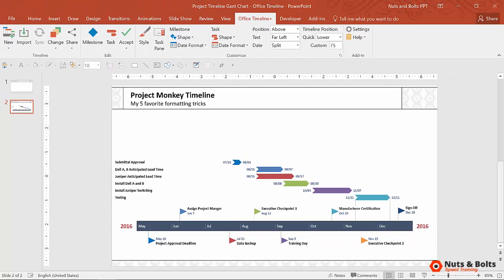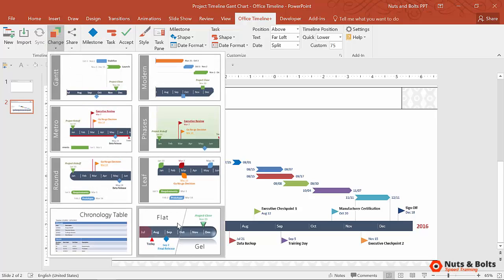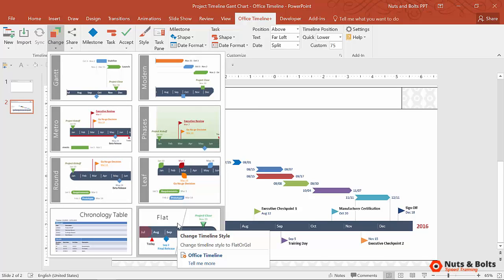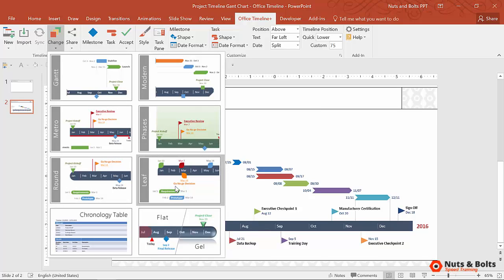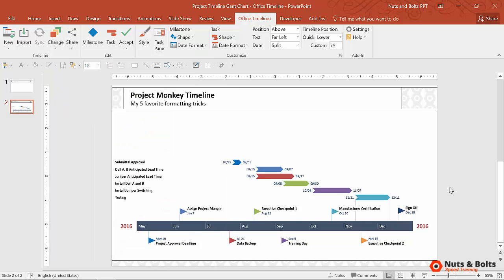But there's a catch to this that you want to be aware of. When you start with your Office Timeline graphic, you always want to start with your macro level formatting styles first, Flat versus Gel, because these macro level formatting options have a tendency to override your manual adjustments, not all of them, but some of them.